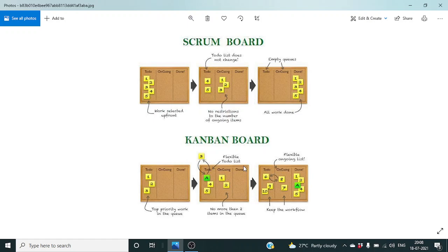In Scrum, the work items are stories selected from the product backlog to the sprint backlog during the sprint planning, based on the team's velocity or capacity. Once the sprint is started, new work items will be added only if the sprint goal is not affected by adding the new stories or items and the team has the capacity. The uncompleted work items or stories are moved to the product backlog during the sprint review for reprioritization.